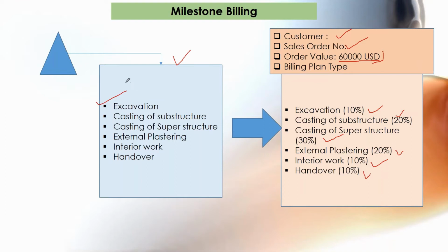Let's say this is your flat number, and with reference to that flat number, this is your WBS element or network activities, and with reference to that one sales order will be created. Whatever activities are mentioned here, once an individual activity is confirmed, it will trigger one workflow to the sales order side to tell accounts that this amount is open for billing.